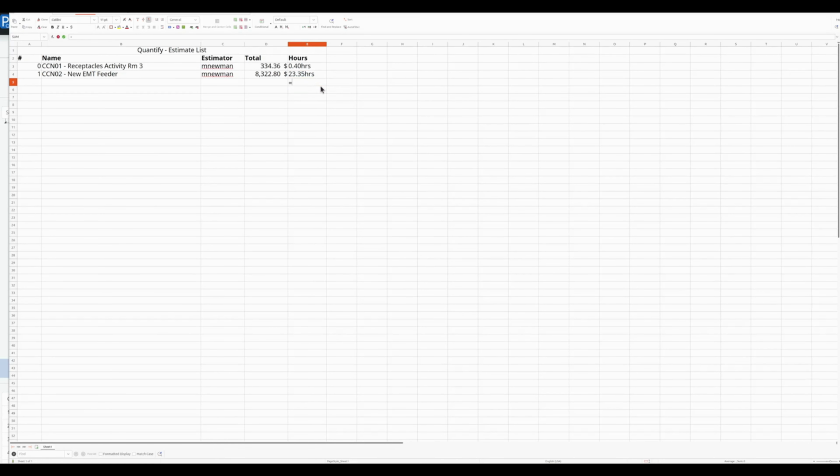So we can very easily show here that we need at least another day in here for all of the hours that were added in each of these change orders. So we've got roughly 24 hours in here, so a day for 2 people working on site on average, we could say. So we need a 1-day extension. Obviously, we're not going to fight over 1 day usually, unless it was, say, a 2-day shutdown job.